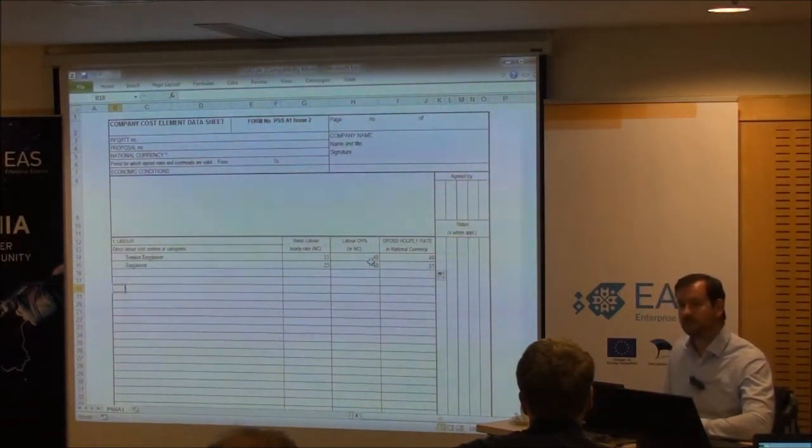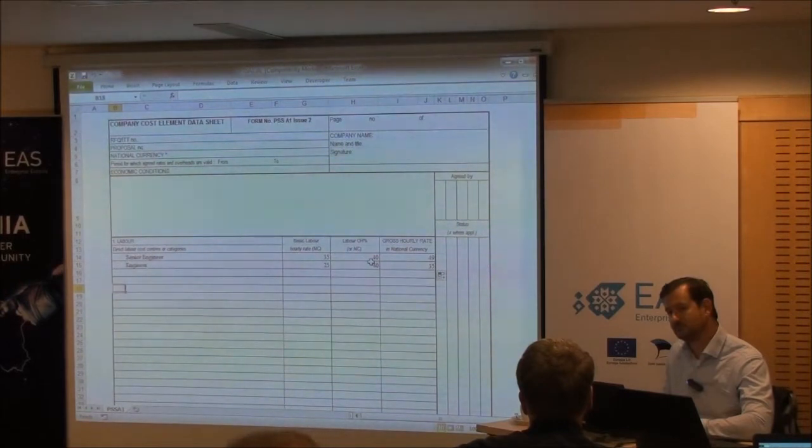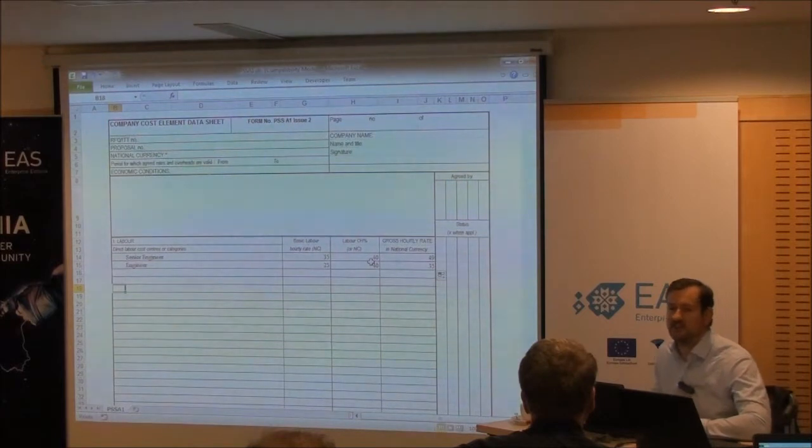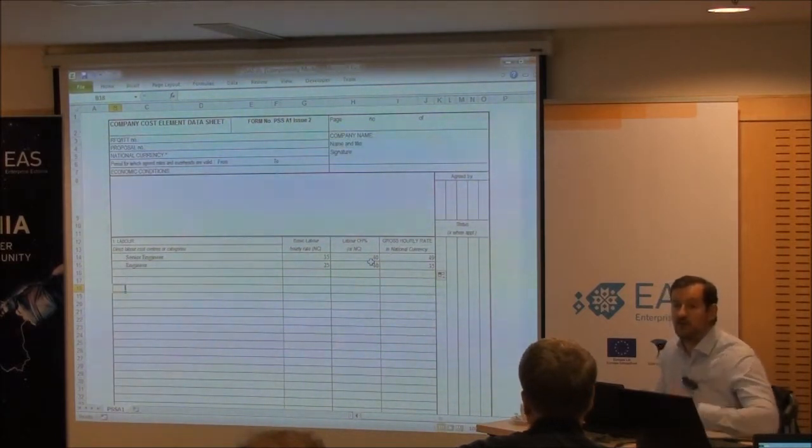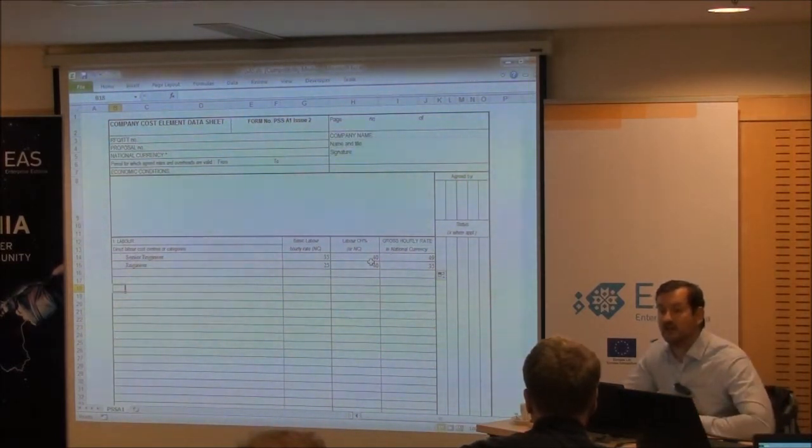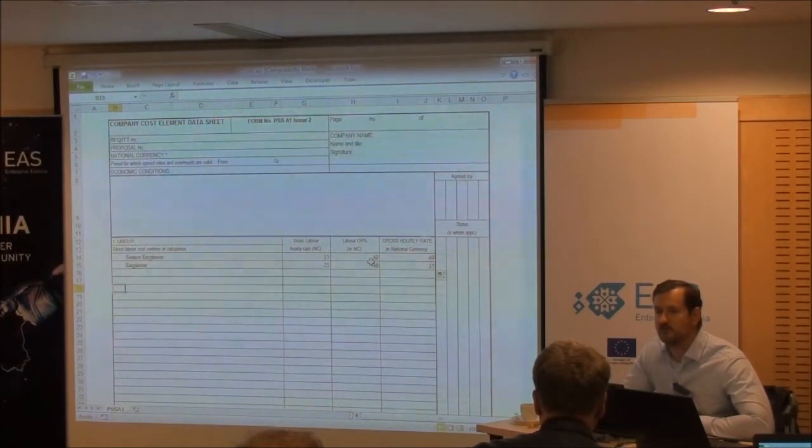What is your experience so far? What is normal, like acceptable overhead for each? Well, you can't really say, because that's normally within the business. It depends how your business accounts for those things. You should already have one. You should know what the raw labour cost is and what your employment costs are, being paid on top of that by the company, and then whatever management overhead or training element, or sickness risk you put on there, or anything else. It's just the standard business model of your organisation.